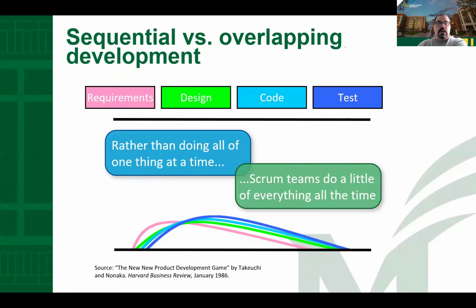So if you think about the waterfall phases, requirements, design, code, and testing, you do all of these things during each sprint. The most amazing thing is, if you remember the curve of the cost, for example, if you discover a problem in the test phase and you lose a lot of money, you don't have this problem because every 15 days you check again if you are on the path.